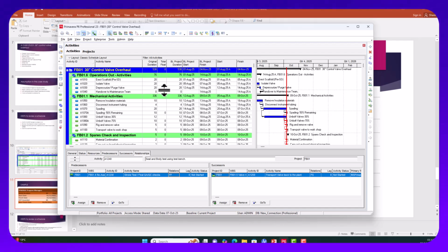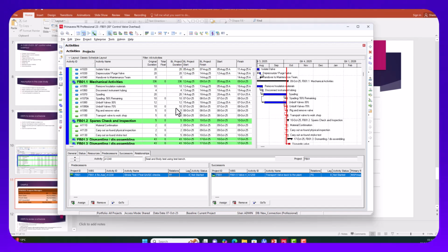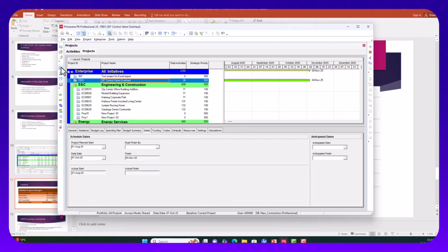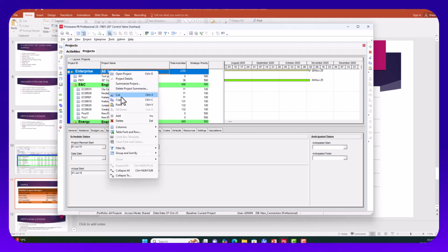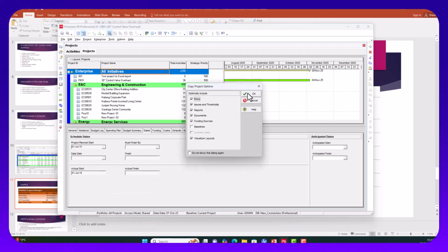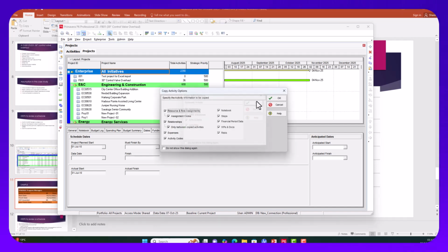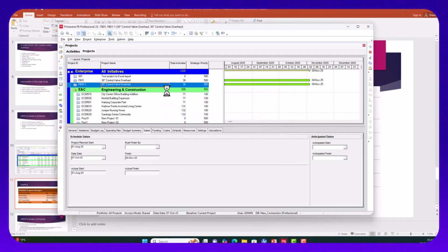Good. So here we are. We've gotten what we want, and as far as this goes, now you're going to copy this project. You're going to copy it because you're not going to save it as a new baseline, to see the effect of what we've done. You're going to copy this project, copy, paste. Primavera automatically creates and puts another number for you, like you have it here.